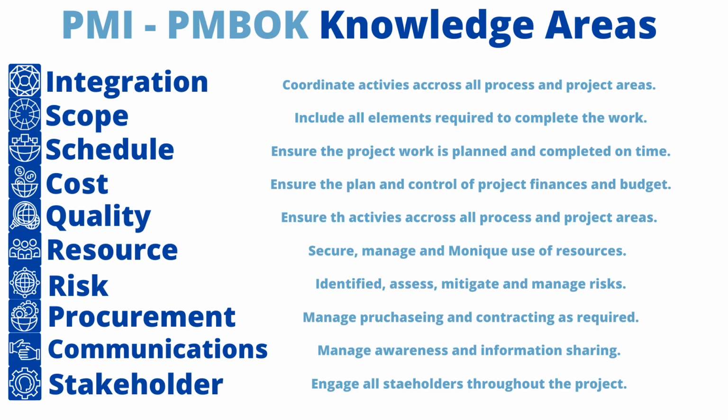So either using your project charter or going through something like the PMBOK 10 areas will help you scope out the components that you need to talk about during your contracting. Now, you don't want to go down into the details because you don't want to get into a wordsmithing game here, but at least give enough detail so that both parties are really clear.